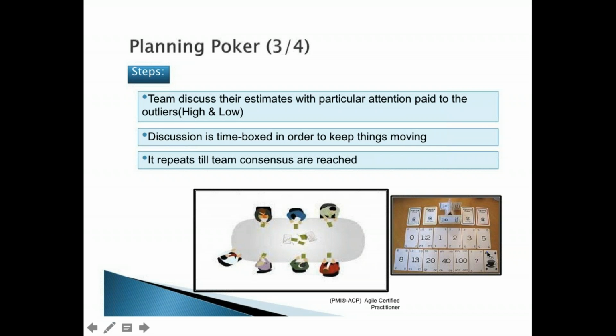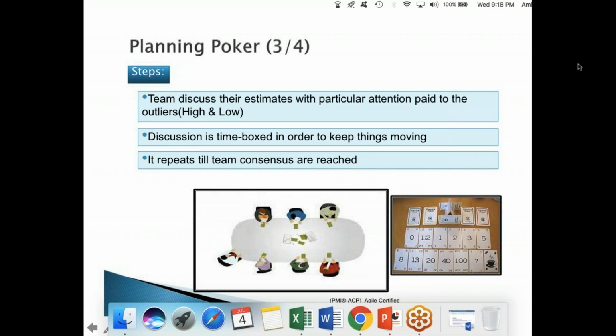This is one more method. There are some digital planning pokers also, normally in a distributed environment where you have offshore and on-site teams. So there is software available with planning poker cards. People choose the card they want, and then they submit. The moment the facilitator says ready, everyone will submit the numbers there. So on the screen, they'll see the numbers. And again, they play the second round. Everything will be recorded. First round, what each member's number is. Second round, third round, fourth round, right? They play this way. This way of doing the estimation is called planning poker.